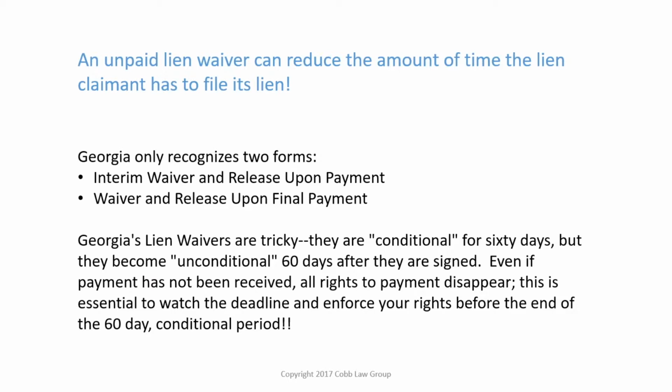If you are required to sign a lien waiver prior to receiving payment, if you have to submit with your pay app or with your invoice, an unpaid lien waiver can reduce the amount of time you have in order to file a lien. But back up for one second. Georgia only has two valid lien waiver forms. That's an important distinction to recognize, valid forms. There's no way that I can tell you over the phone what a valid form is, but it's in the statute. Any lawyer can certainly help you with that.